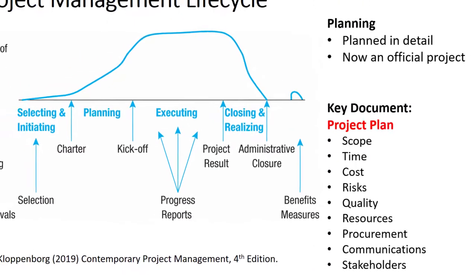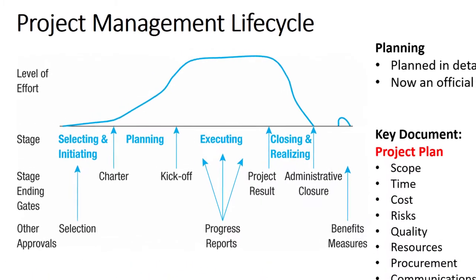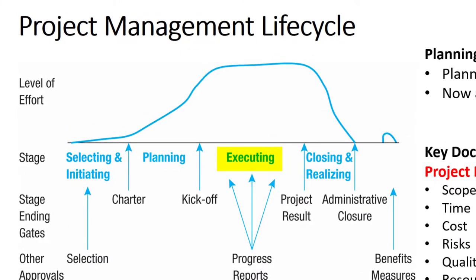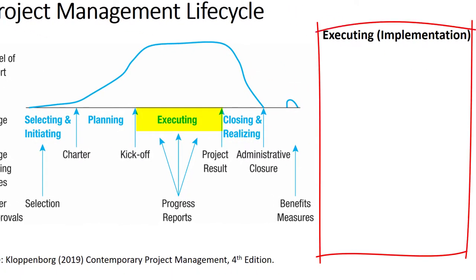Once the detailed project plan has been approved, it's time to implement or execute the project. At this point, there is usually a formal project kick-off meeting or communication which indicates the transition from planning to execution. Project execution can also be called implementation — this is where all of the work gets done. Before this were only planning tasks. The project manager and team will be following the project plan and checking that everything is progressing as it should.